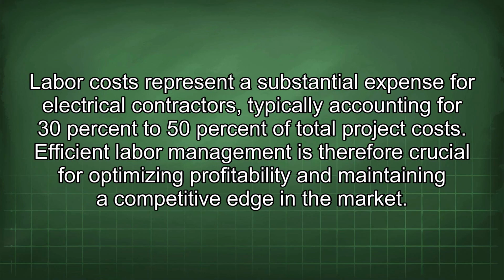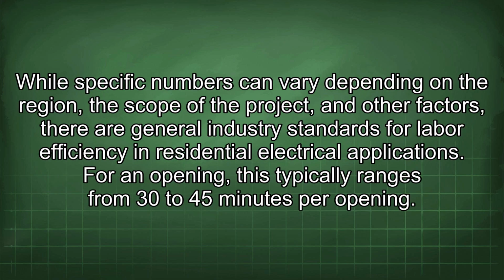Labor costs represent a substantial expense for electrical contractors, typically accounting for 30% to 50% of total project costs. Efficient labor management is therefore crucial for optimizing profitability and maintaining a competitive edge in the market. While specific numbers can vary depending on the region, the scope of the project, and other factors, there are general industry standards for labor efficiency in residential electrical applications.